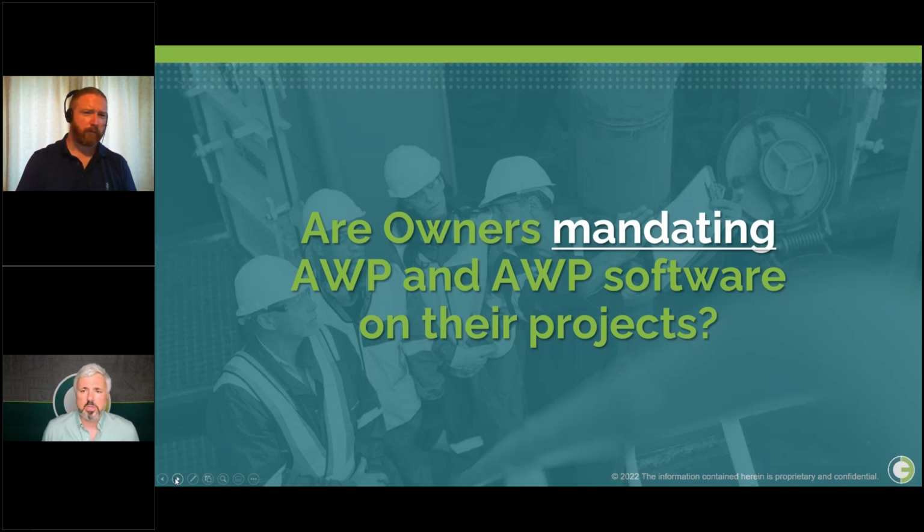It's a little bit different when we're talking about small cap projects, portfolio management. There, oftentimes the owner is providing the software as well as mandating AWP. But some owners believe that forcing a particular piece of software on a contractor will cause issues with contractor performance or lead to change management concerns. So then we see those owners often mandating the process and mandating that AWP be followed and that certain data be provided. But if the contractor can produce a solution that will provide that, then oftentimes that'll be fine. If they're not, then the owner will often say, hey, use our tool as it works and meets those needs.